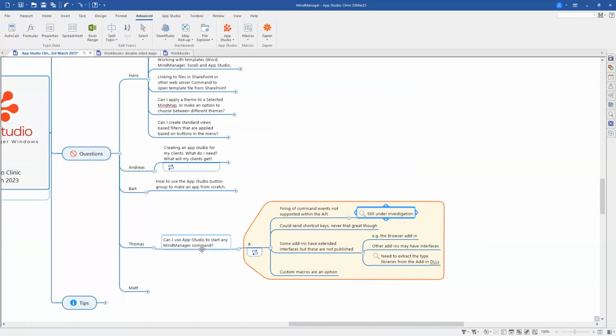It doesn't have to go through the Gantt chart. The Gantt chart has that feature as a convenience, but all the information there comes out of the map itself. So there's no dependency on the Gantt chart itself to be able to create a custom export to CSV out of a project map, which included other information, would be perfectly possible.